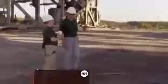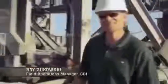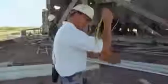Each detonation cord connection and explosive placement must be inspected. Straight away, Stacy finds a mistake. One of the explosives is not connected to the implosion sequence. You can actually see it from here. The problem is fixed, and the rest of the explosives triple-checked. Walking again for the 50th time. Everything looks good. The demolition team can begin the final preparations.